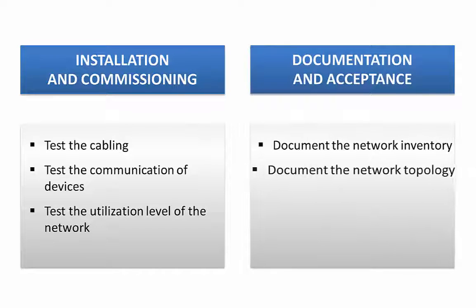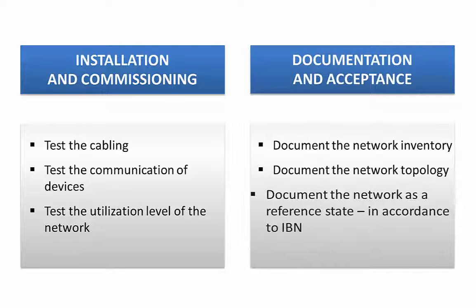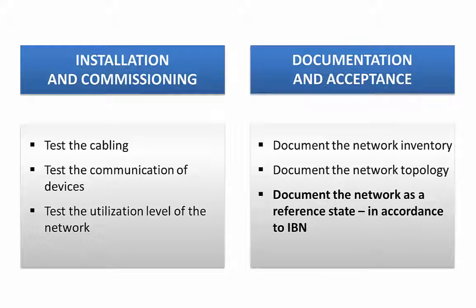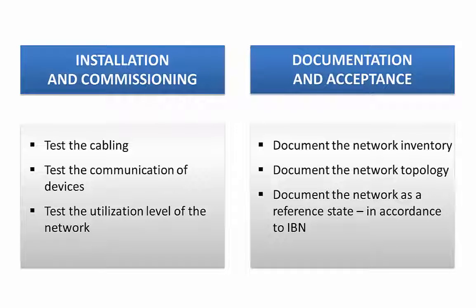In the course of network acceptance, you need to document the network inventory and the topology. Once you have successfully started up your installation, I recommend documenting the overall condition for two reasons: firstly, as a reference for ongoing operations, and secondly, for future maintenance work.